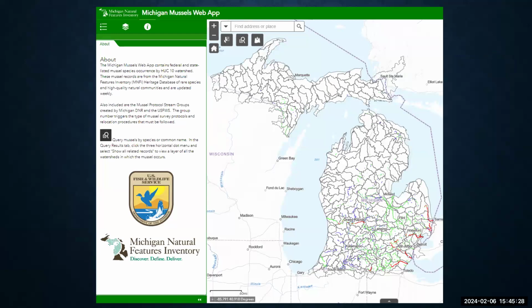And the next part is similar. On a similar note, are there specific guidelines for how long a relocation effort is valid? If it has been greater than X number of years since the relocation occurred, does the relocation have to happen again if construction gets pushed back, for example? We've kind of landed on 2 years, but that can be flexible and very project specific, depending on what was in the project area, what was relocated, and how much data we have of the surrounding area.